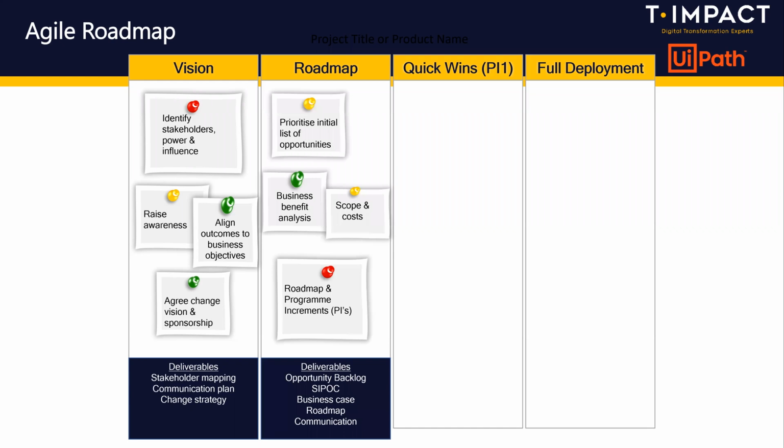So when looking at the roadmap, I think Dean gave a very good summary of the idea to bot approach. One thing that we found in working with a number of local councils now is there's a danger of, A, becoming fixated on a certain process, which may not be the best process for your quick win, or B, overanalyzing, spending too much time trying to figure out which is exactly the right process. In reality, what's important is to get started, start to identify a list of things to look at, and triage those to identify the top 2 or 3 that are worth further investigation.